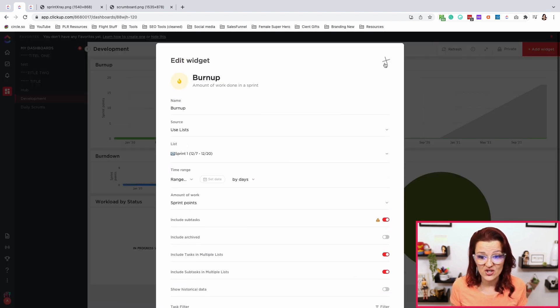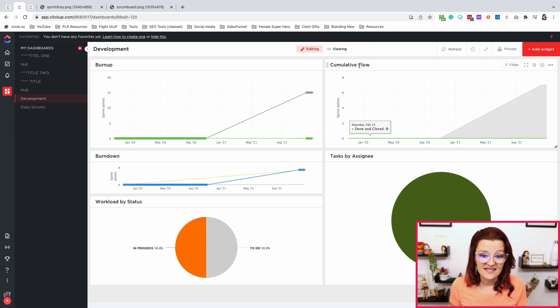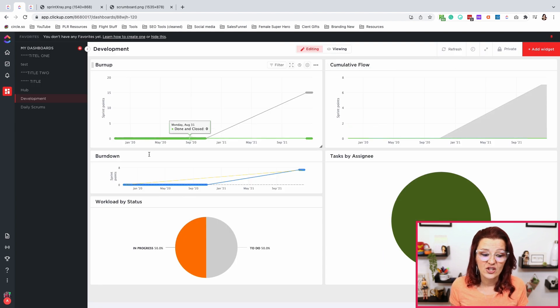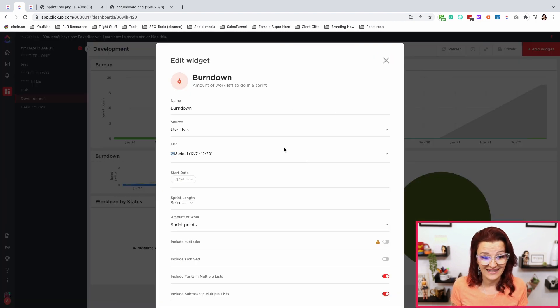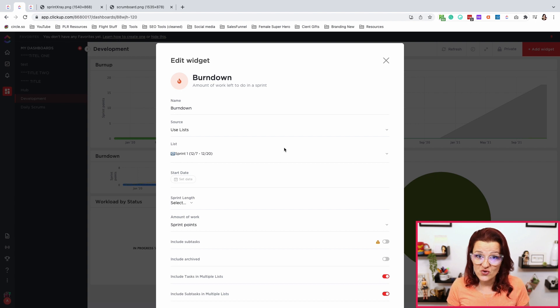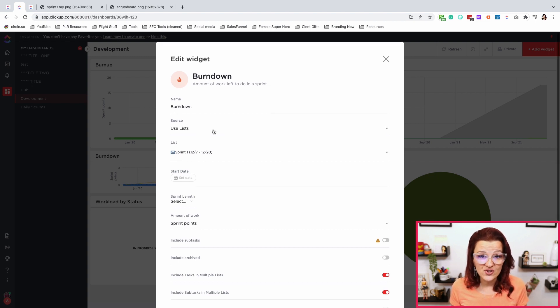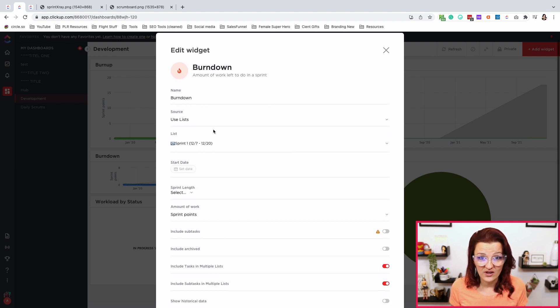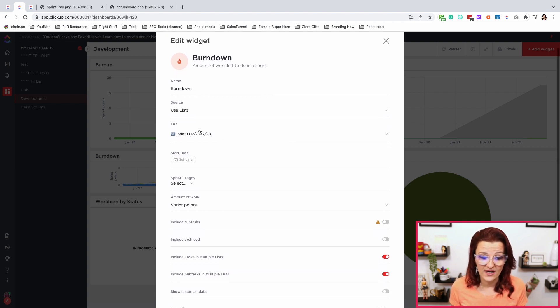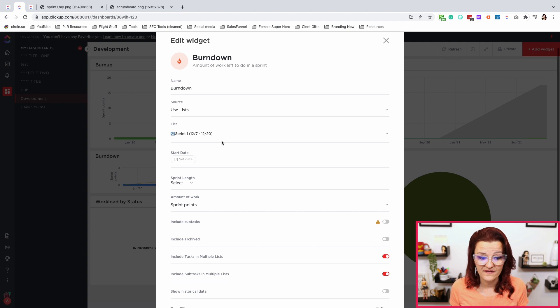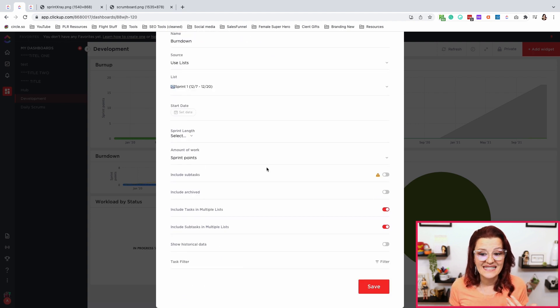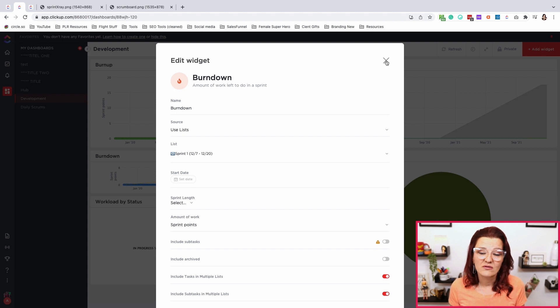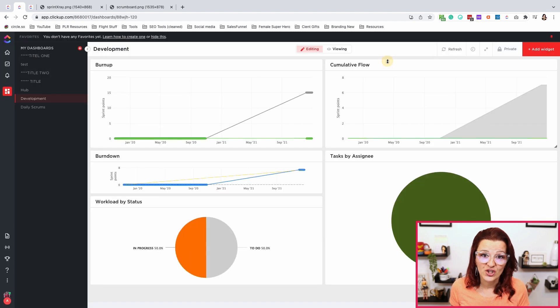Look at that. Just what I showed you, the same way you can set up the burn down chart again. Choose the burn down widget. Use your list that you would like to use for it, that specific sprint. What is your sprint length? You are counting by sprint points. Set everything up how you need it and what you want to see. ClickUp has made this so easy for us.